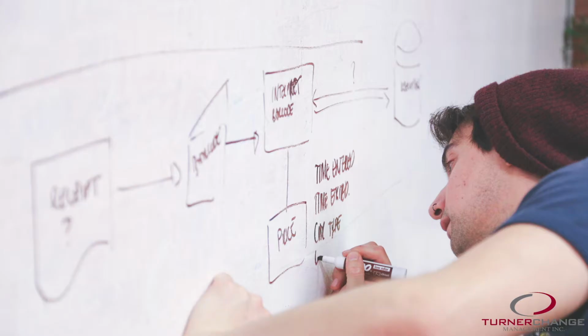Your change management plan also includes, like other plans, the roles and responsibilities of who's going to engage in the activity, who's responsible for ensuring the activities and things get done, as well as start dates and end dates and other resources that might be necessary to enable people to move as easily as possible through that change journey.